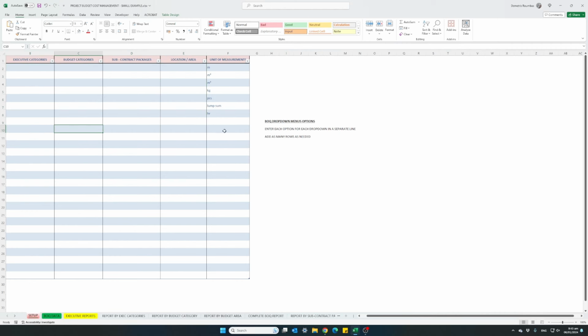120 square meters times 12. Let's make these numbers even easier to understand, so we can do the magic in our head easily. 100 square meters times 10 euro per square meter, 1,000 euro is our budget estimate. If we change the contractor margin to 10%, you will immediately see the totals changing. 10%, so it made it 1,100. It's basically multiplying the quantity by the unit price and adds a 10% margin on the total.